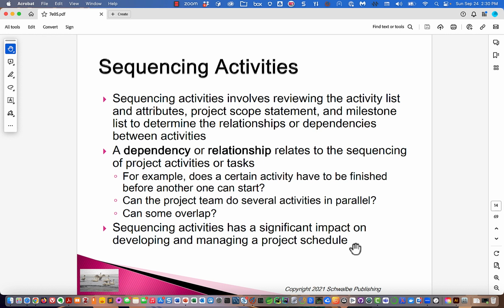And then typically you put more information into the tool about what kind of resources you have and what kind of resources are going to be used by each activity. And it goes through and delays activities until there's enough resources for them to start. That pushes the schedule out later.